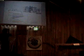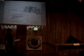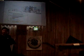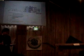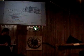This is kind of our spread of all the sections where we scored. It's kind of hard to read, but really what we did is we went after just a baseline score, and that has to be greater than a 35% score on the survey. And then that'll get you 1 Green Globe, and we're happy to have that Green Globe level. The second level is up to 55% score on the card. We're somewhere around 40% right now, so we could probably push for another level. We got to see how kind of the rest of this plays out.